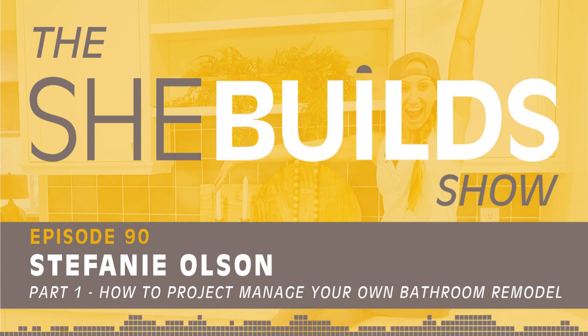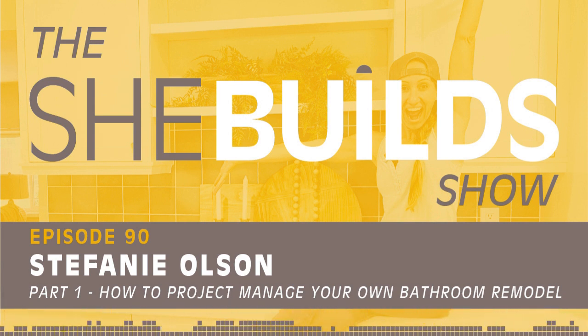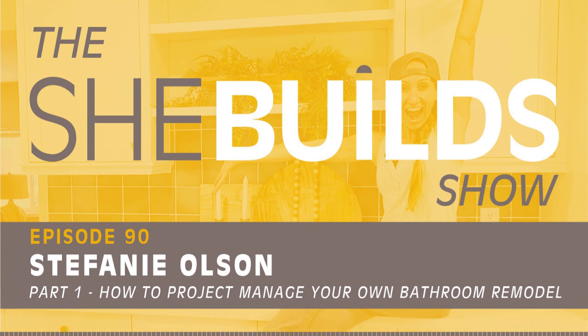So you're going to type up a scope of work for all of those people. Demo, framing, HVAC, plumbing, electrical, drywall, paint, cabinets, and tile, and then your accessories if you can't do that yourself. So this is part 1 of how to manage your own bathroom remodel. And then we'll go into part 2 on what to do with those typed up scope of work, your floor plan, and your design, and what the next step is. See you in the next one.